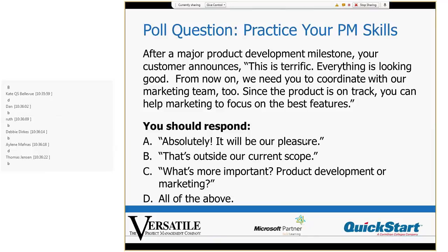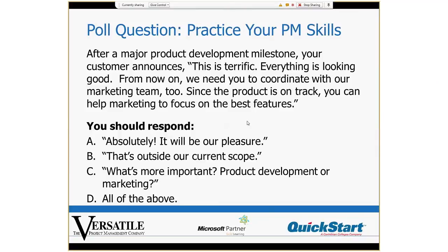And here's why. First of all, think about this. Wouldn't it be nice if someone paused your project every time an opportunity for scope creep appeared? Because that's what happened right here. Now, I think all of us were tempted to answer A, right? Because who wouldn't want to just say yes to their customer? It's the most natural thing in the world. But that intention to please our customer is the source of scope creep.